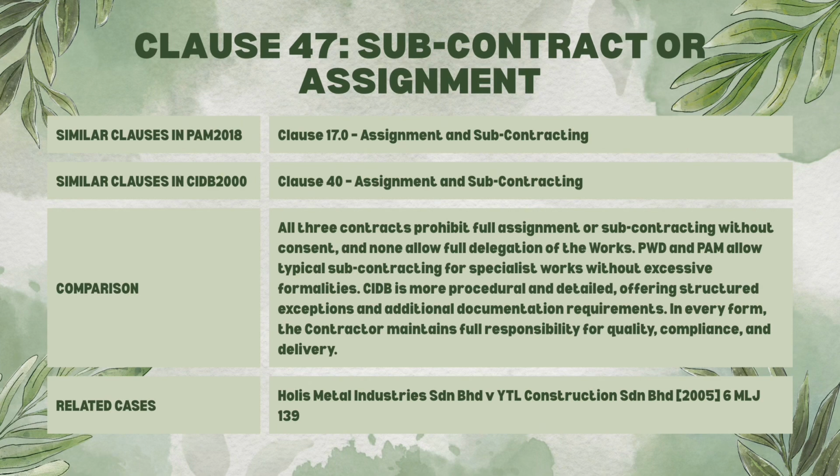The case related to this topic is Holis Metal Industries Sdn Bhd versus YTL Construction Sdn Bhd, 2005. The facts are, YTL Construction Sdn Bhd was the main contractor for a project. Holis Metal Industries Sdn Bhd was appointed as a subcontractor to carry out specific works under YTL. A dispute arose when Holis Metal alleged that it had not been paid for the work it completed. Instead of suing YTL, Holis attempted to claim payment directly from the employer, bypassing YTL. The legal issue here is whether a collateral contract existed between Holis and the employer.